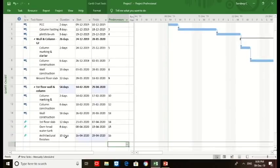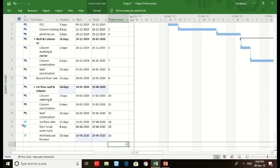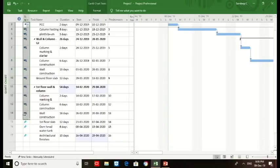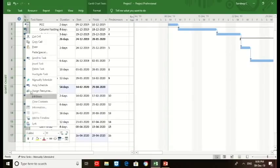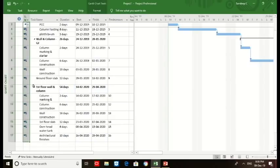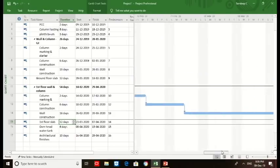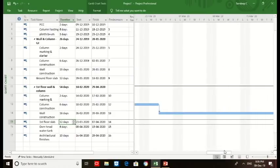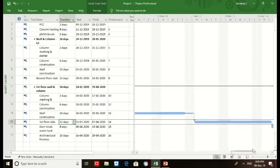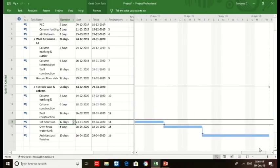As we are adding the schedule type activities, the final activities, all the structural works are finished. Now we are roughly done with the schedule. We could see some of the activities are auto scheduled, some are manually scheduled. We make it uniform, select those tasks, and make it auto schedule.